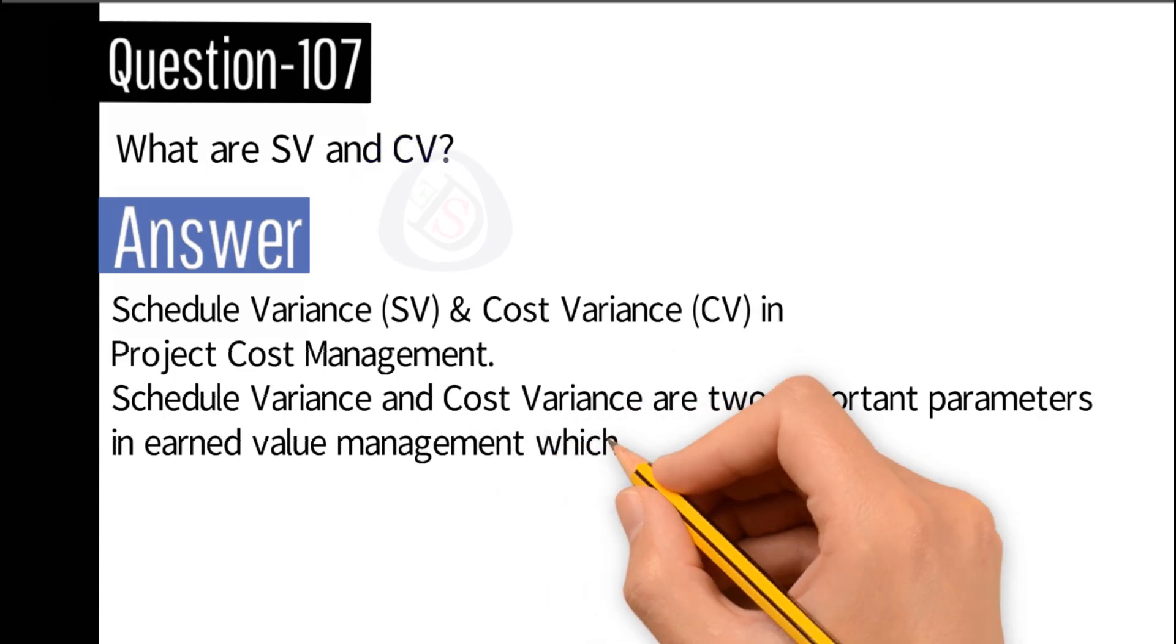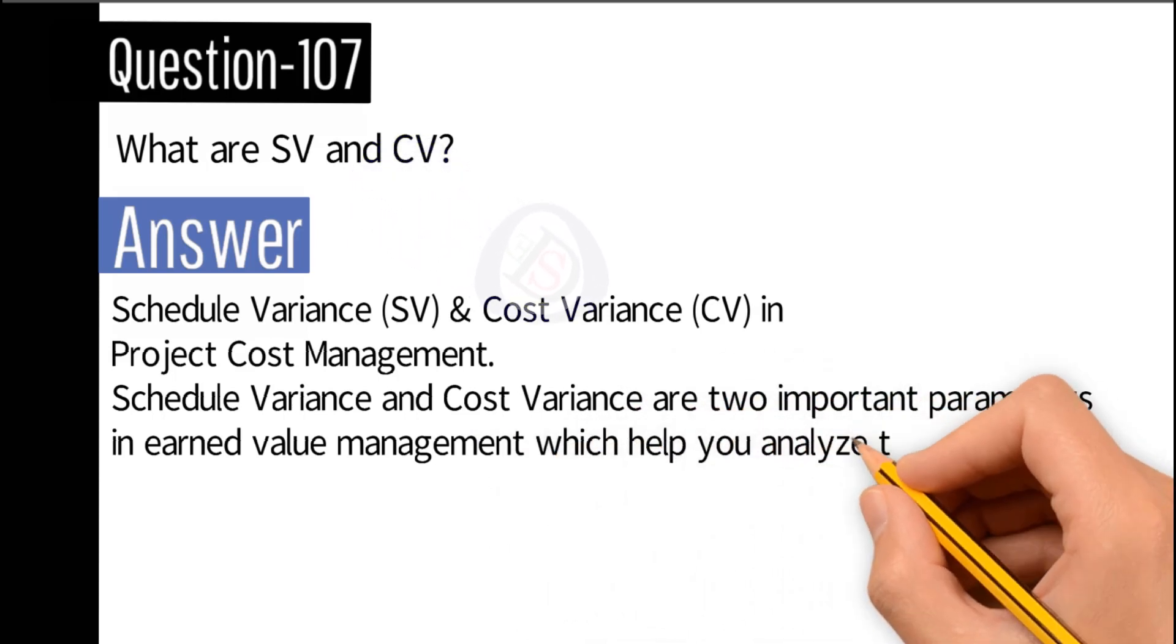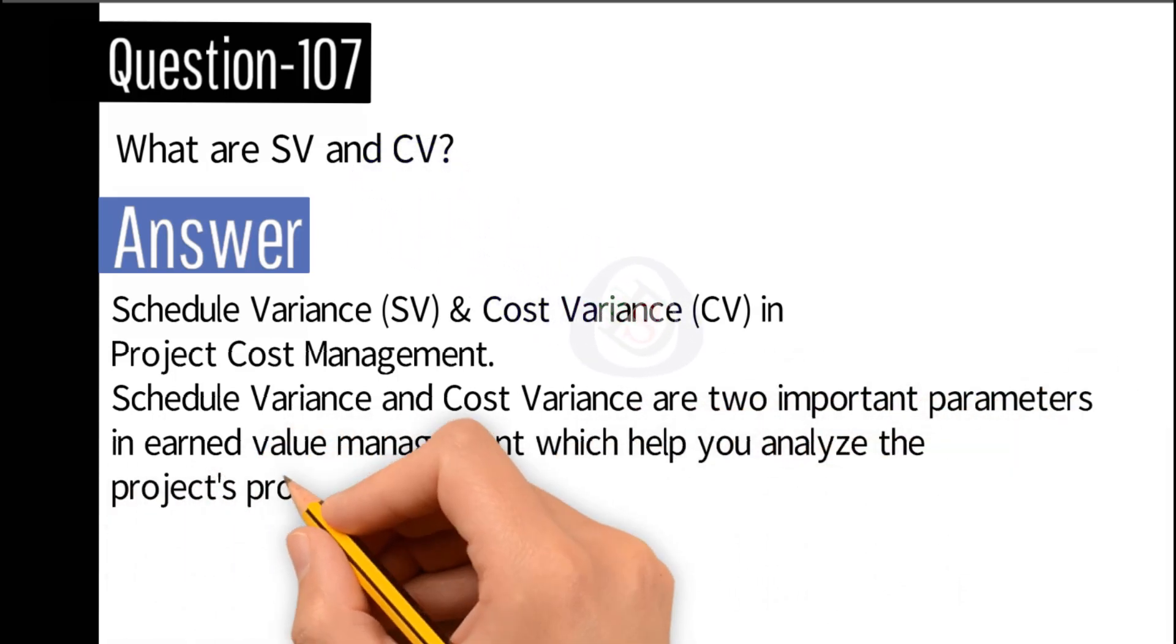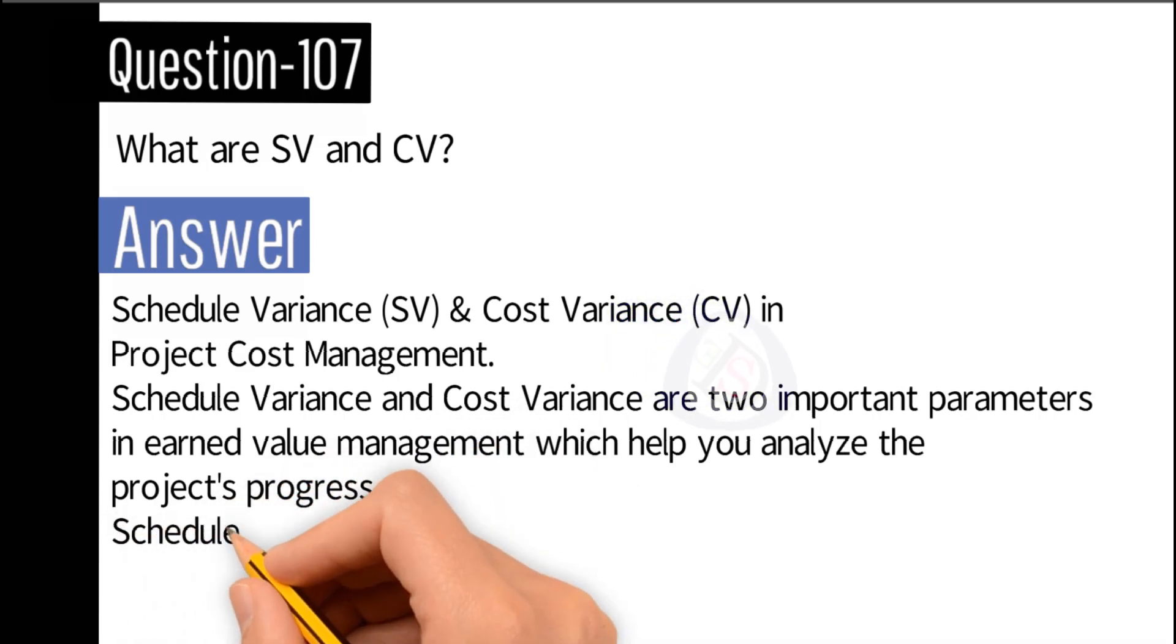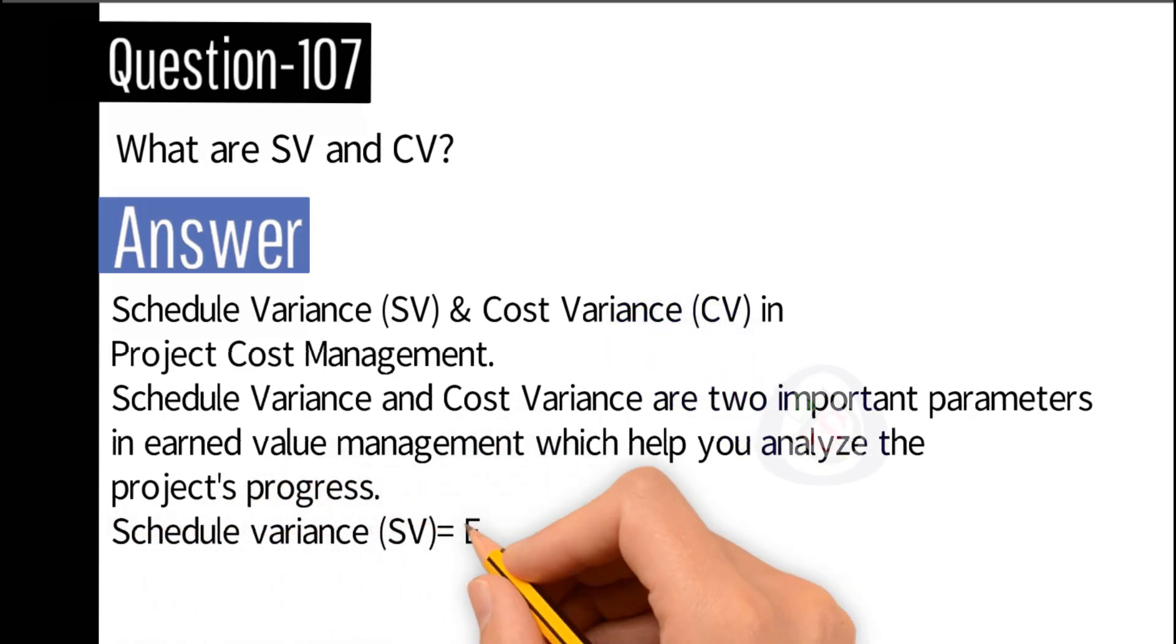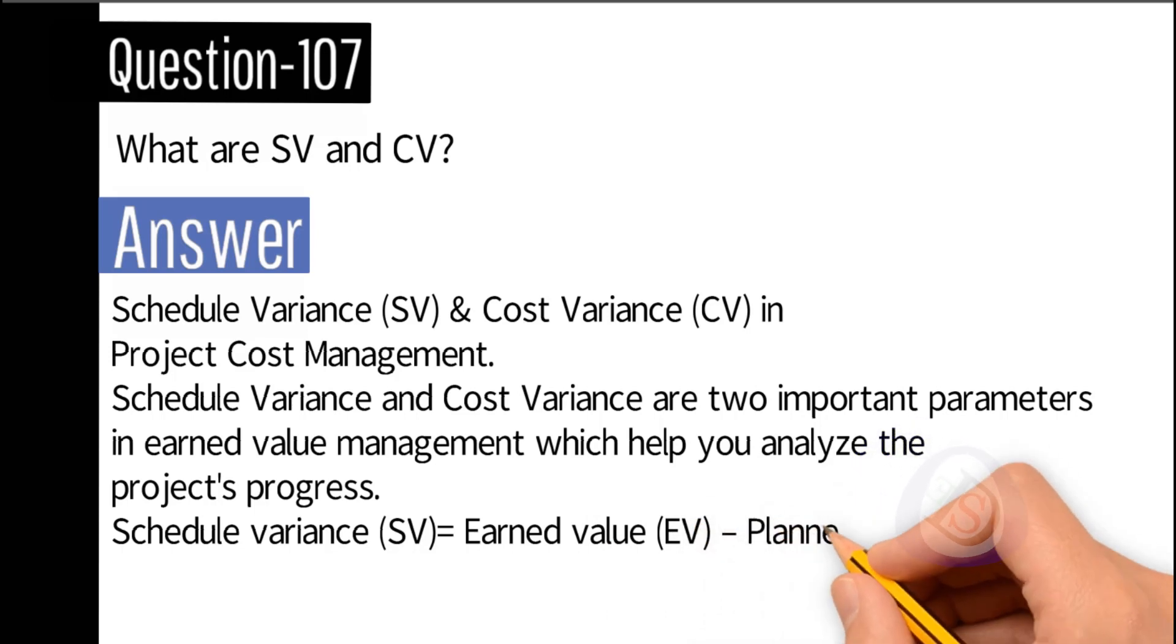Schedule variance: SV equals earned value (EV) minus planned value (PV). Cost variance: CV equals earned value (EV) minus actual cost (AC).